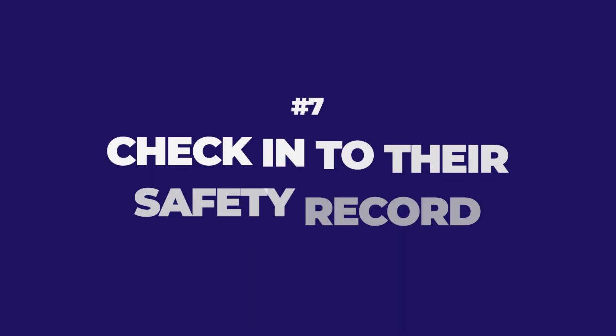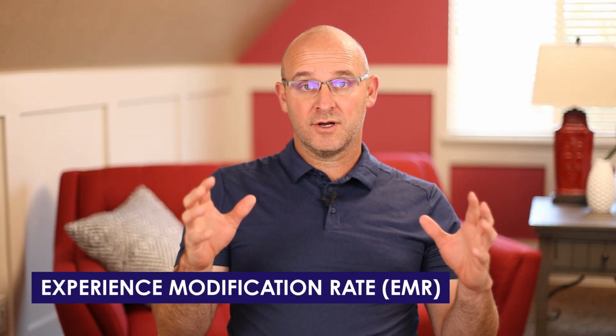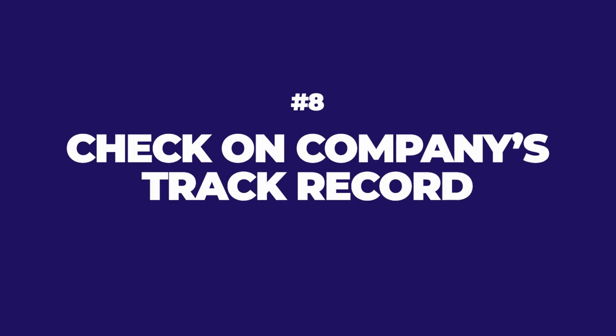Number seven, you can check into their safety record, and this is pretty easily done. You can check into their total recordable incident rate, their experience modification rate, their EMR, and any OSHA reports naming their company. So always check on their safety record. And number eight, check on whether or not the company has been involved in any legal disputes and what their track record has been, and a key component is how they've resolved them. So those 8 keys in the evaluation process are going to help you to be very successful when you're performing your evaluation.